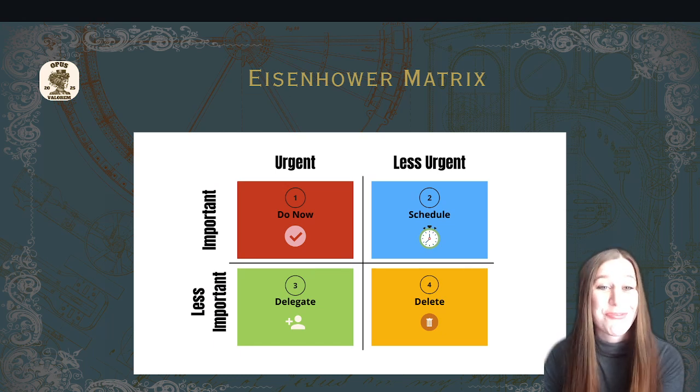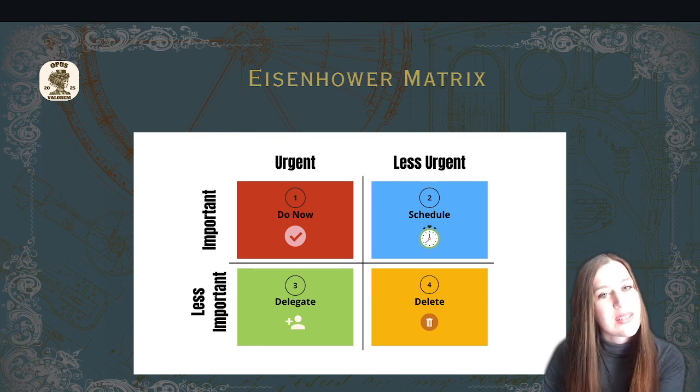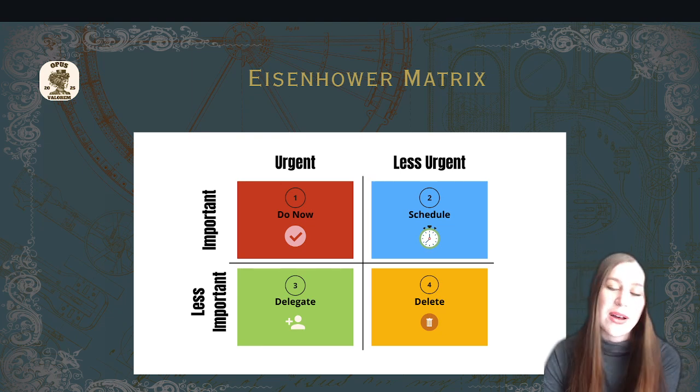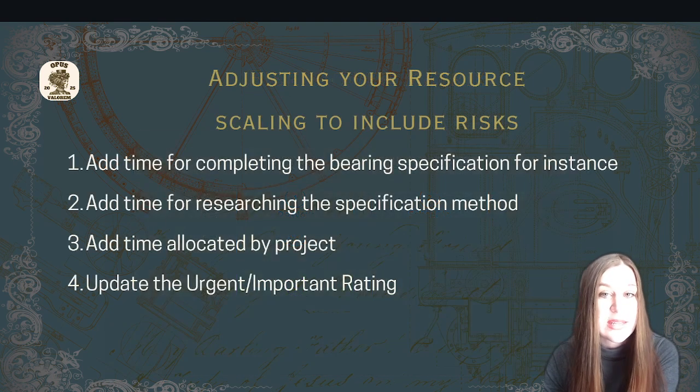At the combination of project deliverable timelines, all the project deadlines always occur exactly at the same moment and exactly at the least opportune moment. You will prioritize the urgent and important tasks, and then the urgent non-important tasks, and then the non-urgent important tasks, and finally you will think twice about completing the non-urgent non-important tasks. I want to get to the addition of risk management on this step.